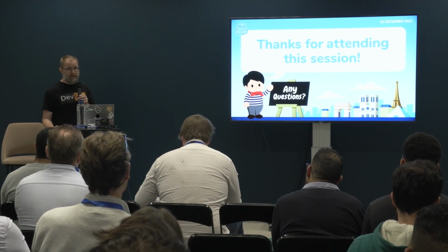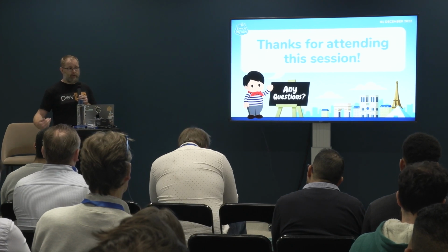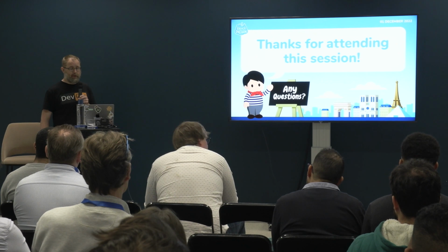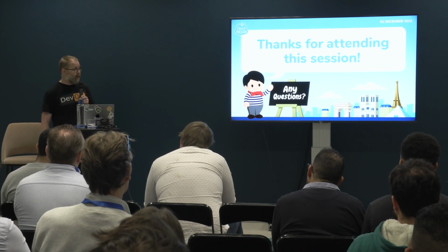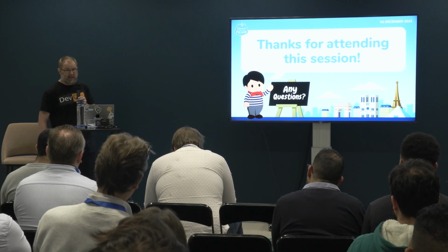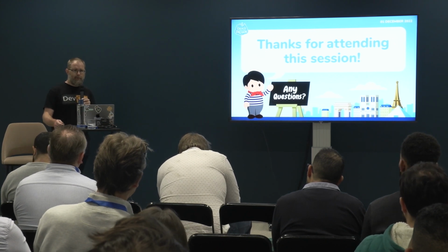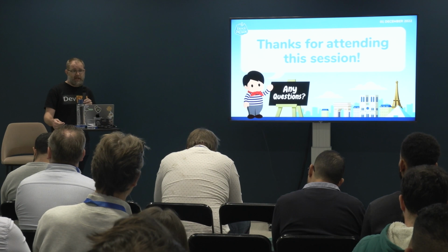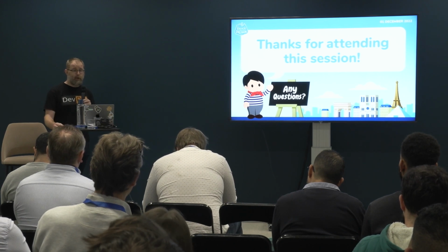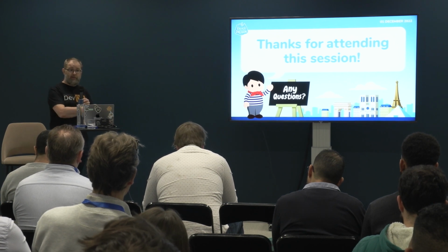We can either, as developers, periodically, as part of our working practice, pull from that branch to make sure that we include it into our own branches, our feature branches. Or equally, we can do automation, which is effectively doing the same thing. We can set up jobs that will do a pull request. It will potentially do a diff between those environments, or pull from the hotfix branch. Ideally, your hotfix branch should be feeding back into your main or master branch anyway. But between those two techniques, you can then deploy backwards down your chain.